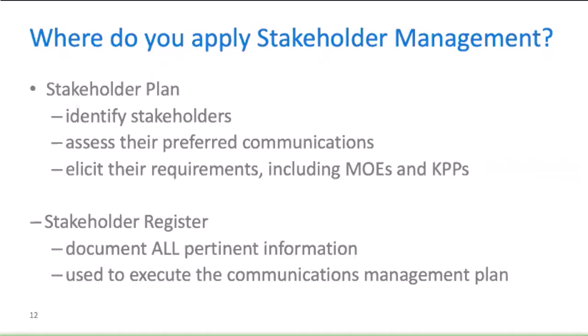But I want to point out that it's important that this plan and register are known as artifacts of the project and are typically held very closely, as some of the information in compilation is going to be confidential to you. It may not be complimentary. For example, if there's a stakeholder identified that has an intense interest in your project, but has no authority or responsibility, they may desire face-to-face communications very regularly, but the project manager may deem that it's best to only provide a general summary statement once a quarter.